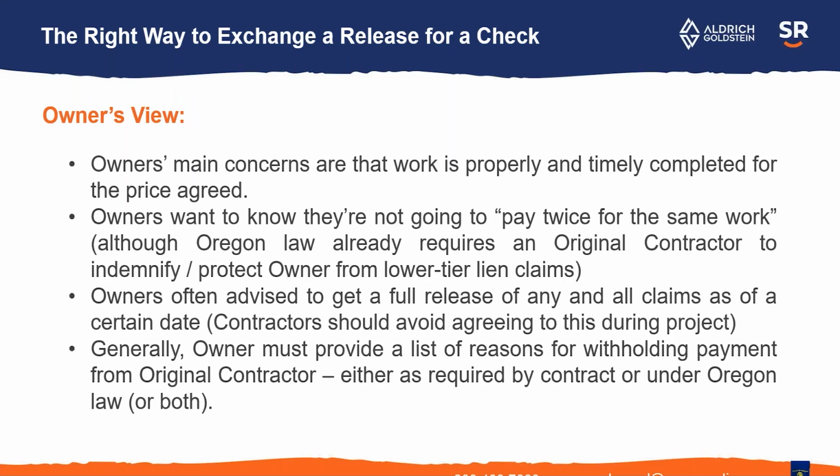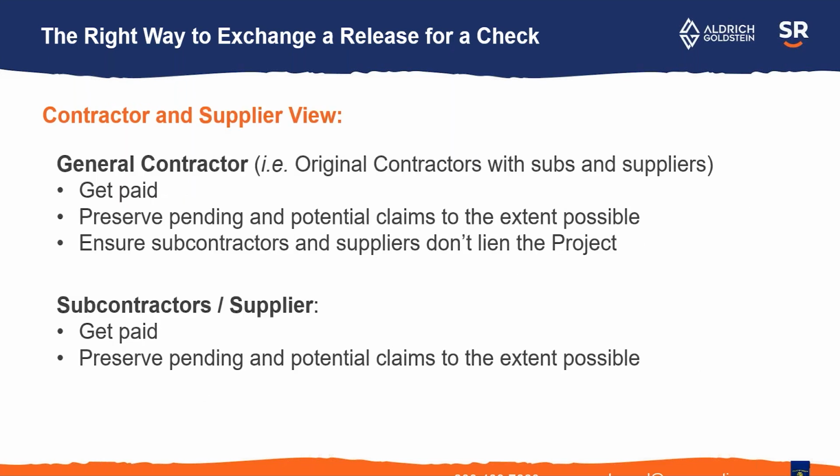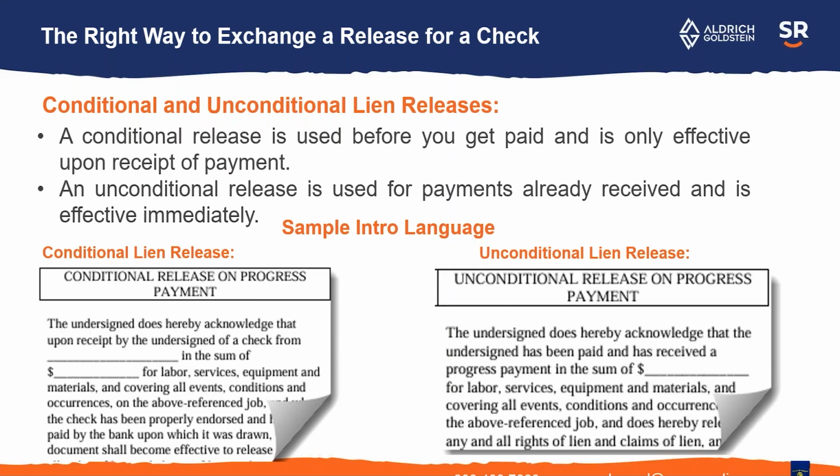So sometimes owners are counseled to get these really broad releases every time they make a payment. As a GC or a sub, you want to get paid. You want to preserve potential claims to the extent possible. So you have this sort of battle between a really broad release that the owner might be seeking or that a GC might be seeking against a subcontractor, and a narrow release that is the type that we recommend, if possible, that is just limited to the extent of payment.